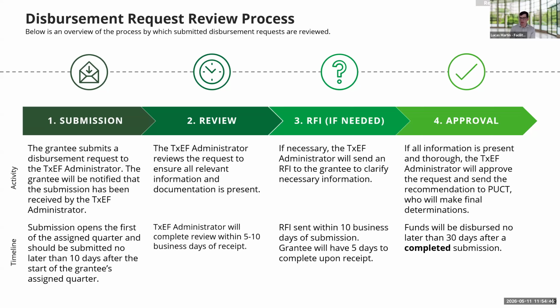So you can anticipate that if there's an RFI to remediate any issues, that notification will be sent to you all within 10 days of receipt of the documents and their disbursement request. Then, following the same process, you'll have 5 days to respond and provide either supporting documentation or whatever the RFI entails to remediate the issue.